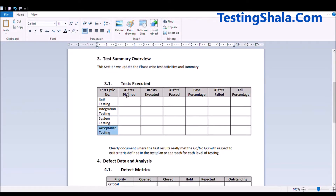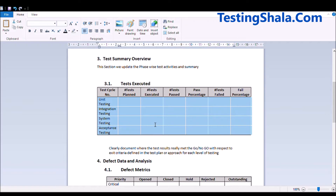For every phase, we are going to talk about the number of test cases planned for execution, what number were actually executed, how many test cases passed and the pass percentage, how many test cases failed and the fail percentage — across each level of testing. For every level we are going to give the detailed numbers in this table.